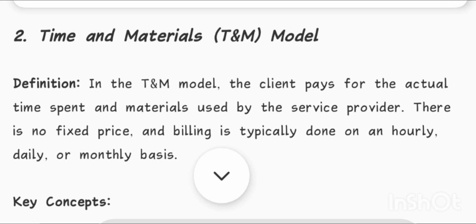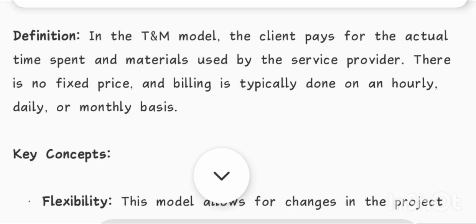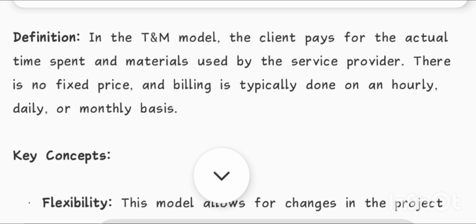2. Time and material model. Definition. In the T&M model, the client pays for the actual time spent and materials used by the service provider. There is no fixed price, and billing is typically done on an hourly, daily, or monthly basis.